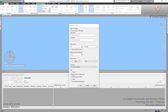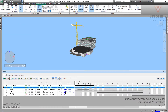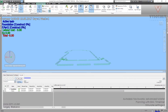Let's try Planned Actual Differences. You should know that we have the construct task type for the first task. The construct means that the start appearance is green transparent. When the actual start is early, it's green, and when it's late, it's red. We want to find out when the elements will be highlighting for this option, the Planned Actual Differences.